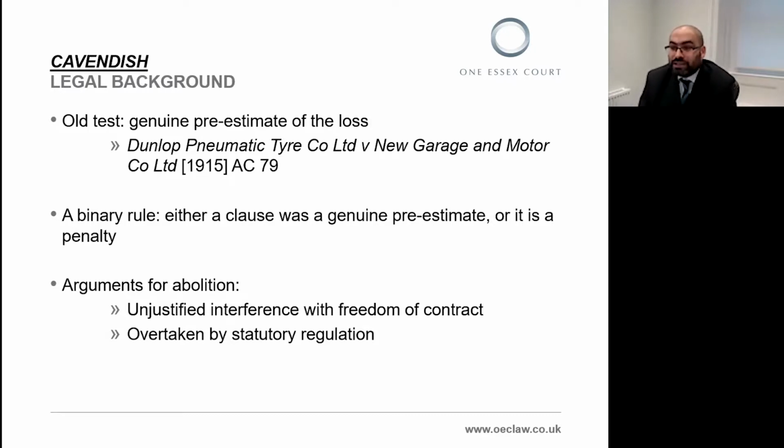Before turning to the decision of the Supreme Court, I'll just give a very short legal background of where we were before Cavendish. Prior to this case, it was thought that the correct test to establish whether or not a clause was a penalty was whether it represented a genuine pre-estimate of the loss. That is the test you probably learnt in law school.